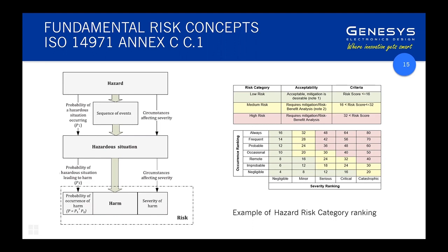That's a really good question, and it's common. I think about it as a hierarchy. Try and find evidence if you can from literature, or there's a lot of databases. A lot of the different regulatory bodies have data on different hazards. So you can get a starting point for probability.